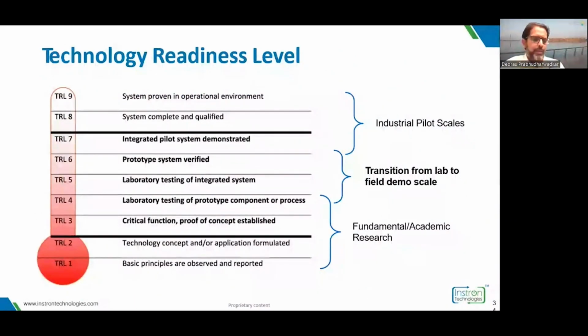I think I heard a couple of speakers talk about TRL, right? So that's basically the guideline that we use in terms of where and how we scale up from a lab scale, an idea to a product, right? So technology readiness level is what the TRL means. We start with TRL 1 and 2, really the one where you get the eureka moment, the idea. That's where you start working on the proof of concept, right? Only the fundamental process, the fundamental key process that you're working on, that's something that you would try to validate